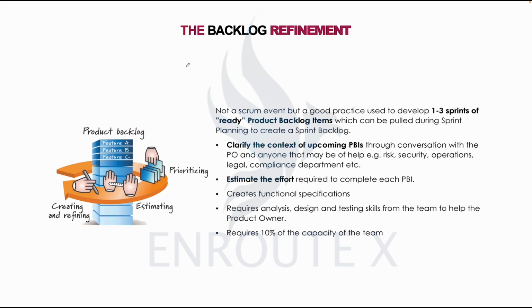The backlog refinement is not a Scrum event. It did not originate from Scrum, but it has been seen as an event of value, or a meeting of value. That is why, if you remember, when we started the 3-5-3 of Scrum, on the 5 events, we also included the backlog refinement as the 6th, but it was clearly separated as not one of the 5.